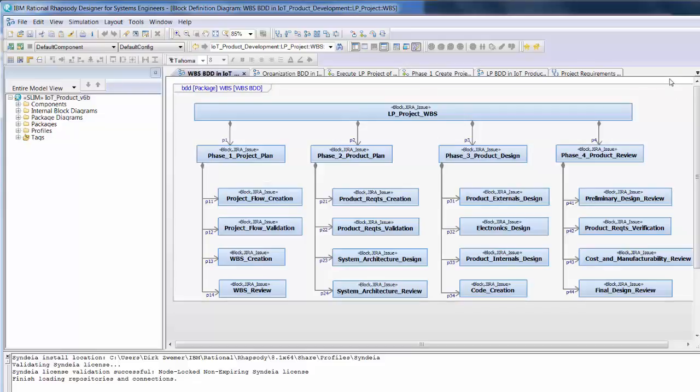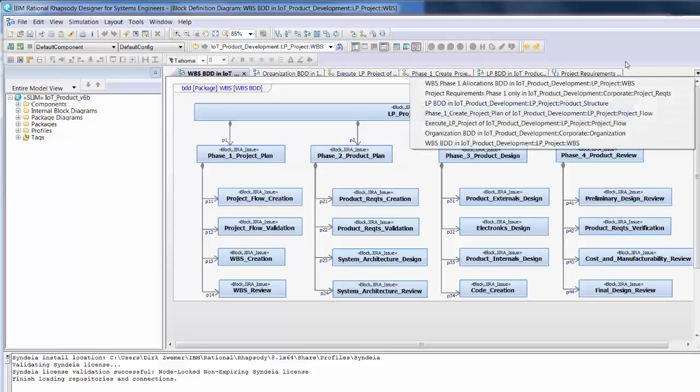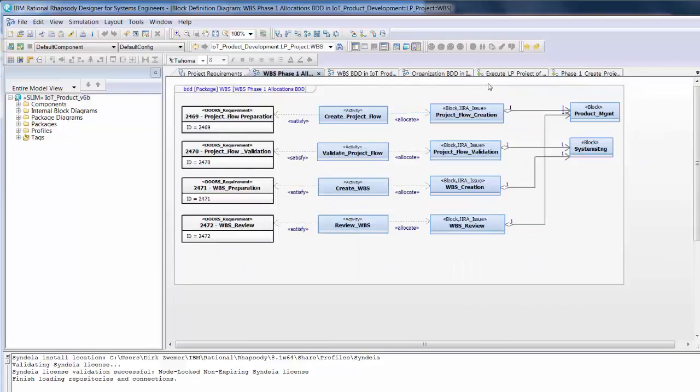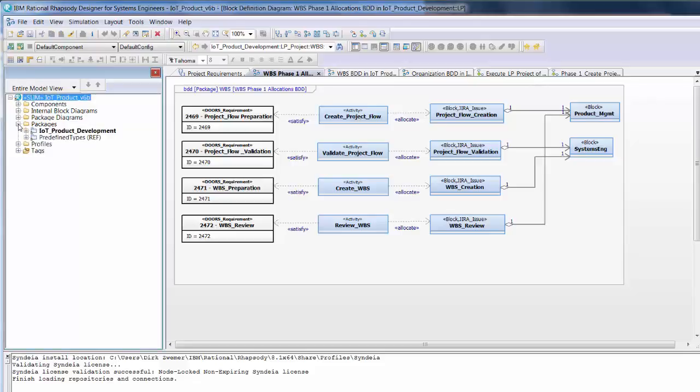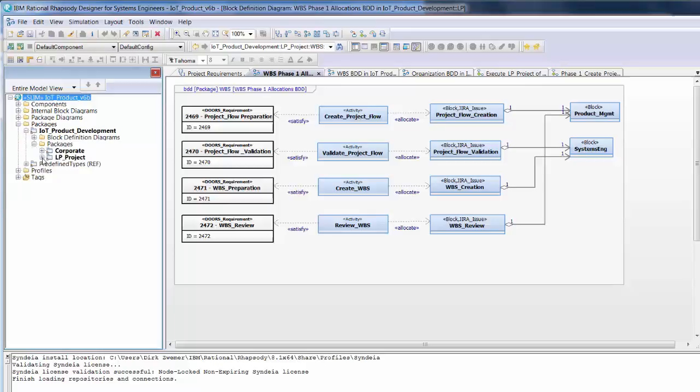A critical step is to link these elements in the SysML model. As shown in this diagram for the first phase, project activities satisfy project requirements, and are allocated to WBS tasks. These tasks reference the organizations assigned to carry them out.